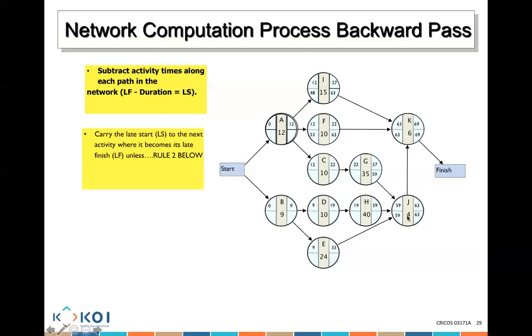Perfect. Okay, what I want to ask you now: this latest start here becomes the latest finish of the one before it. So could you please tell me what would it actually become? The latest start here becomes the latest finish for the one before it. So what should it be here? 59.